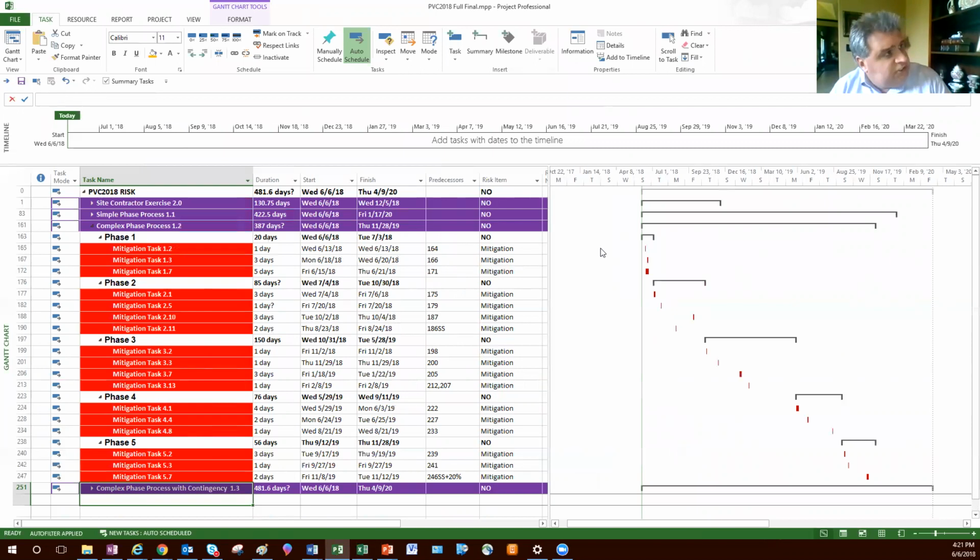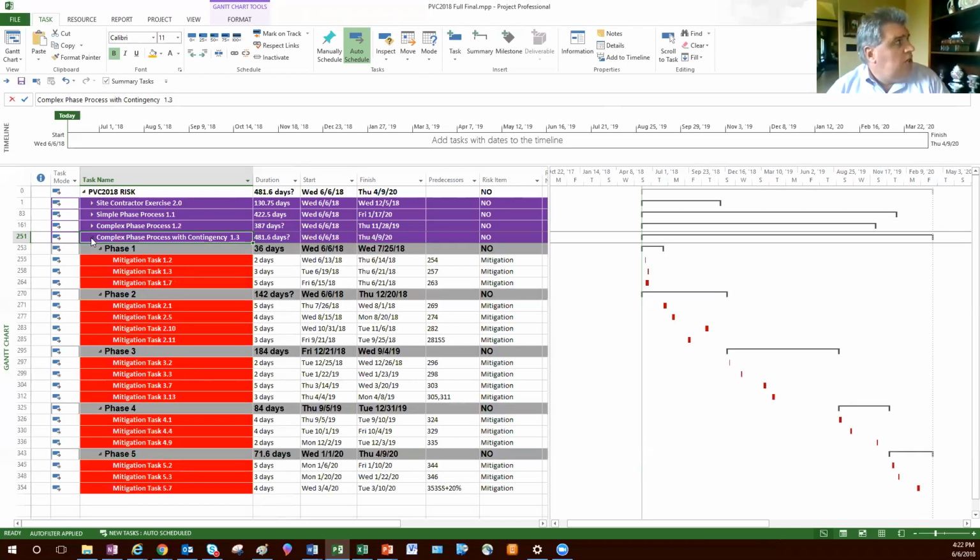All right, there's more, but you can see they're not all at the beginning of the project phase. They're spread throughout. So as the project advances, we learn more information and we're able to attack things in a better way. That means we continually look back at our mitigation that we've determined and refine it as time goes on. When we refine it, we might be able to get an even larger bite out of probability, or maybe even a larger bite if it's that rare case where we can actually change the impact. Okay? So it gives us the opportunity to do the natural learning that happens in a project as time goes on. All right?